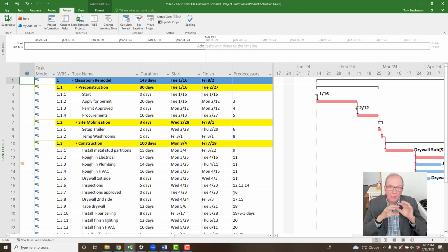All the while keeping in that baseline information of the original timeframes, because likely, well, it depends what it is, but construction projects, likely you have contractual commitments to meet certain dates. And so for us in the construction world, it's important then to know, are we going to be able to still meet those dates? What are some of the repercussions of not meeting those dates? Why are we delayed? Did we cause the delay or did someone else cause the delay? So I'm hoping in future sessions to get into that and sort of unpack all of that.